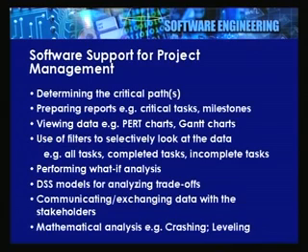First and foremost, the software can very easily help you in determining the critical paths, an activity which will take you a very long time to do by hand, especially if the number of activities is large. Then preparing reports, all kinds of reports are required: critical task, milestone reports, today's task starting, today's start and finishing, which were supposed to start today and didn't start today, and so on and so forth. You need to prepare reports.